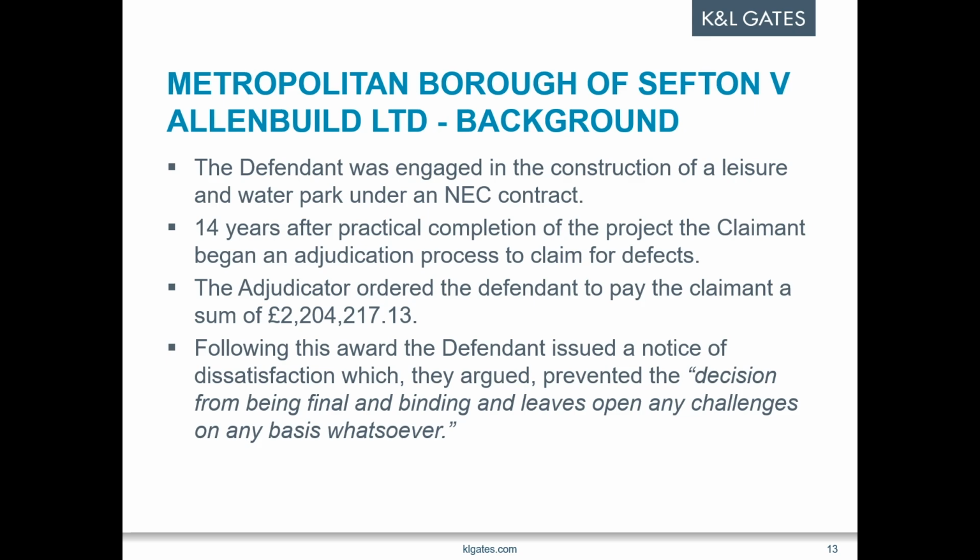Allenbuild resisted enforcement and relied on a notice of dissatisfaction issued in relation to, and this is a quote from them, the entirety of the adjudicator's decision, including all of the adjudicator's conclusions, reasonings and decisions. It's fairly clear, I think, there. It's just everything. Allenbuild claimed that this prevented the decision from being final and binding and leaves open any challenges of any basis whatsoever, whether as to enforceability or final determination.